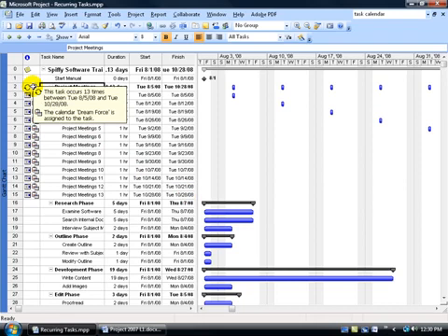And of course, you've got the little icon there, the task. It says the calendar Dreamforce is assigned to the task, which is important because as you're going through your project, if you're looking at this and going, man, when can we schedule meetings? The project managers, when are they available? Is it just for 2 hours from, let's say, 3 to 5 in the evenings? Get all that information up front at first and create your project manager calendar and then assign it to it. So that way, if you're confused, you can say, oh, that's right. These guys aren't part of the mainstream Dreamforce calendar. They've got their own little calendar, their own little times that we have to be aware of, and that's why this is going to be different or look different when we assign a different calendar to it with different working times.